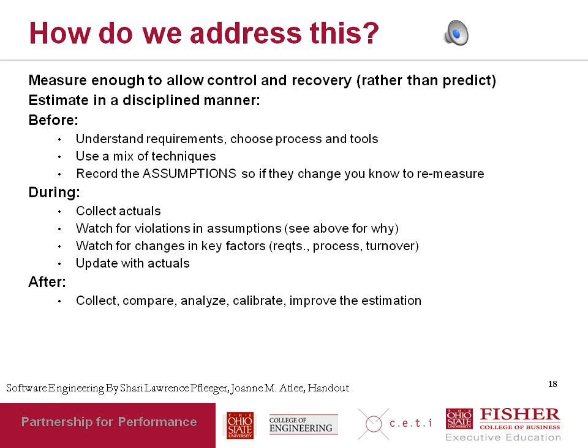So if you remember, when we did the business case for the project with the high volume law firm, the technique we used to do the estimation was basically a resource-based technique. We assumed that there would be a team lead and say 4 developers to do this project for a year, and we estimated based on the cost of the developers. Well, that's one way. Now correlate that estimation by listing all the use cases and estimating what it would take to implement each use case, and compare that estimate with the first estimate, things like that.